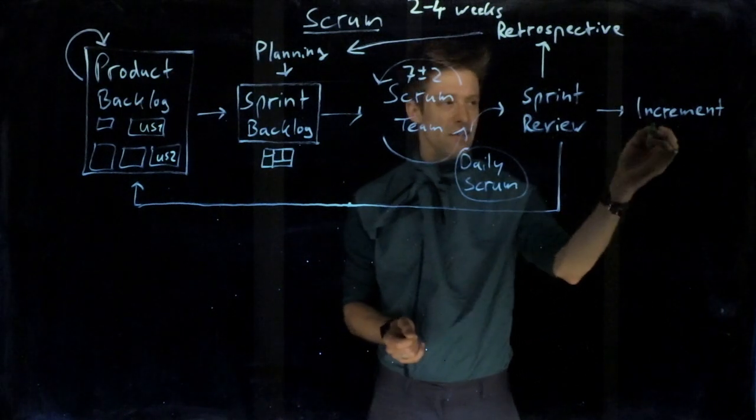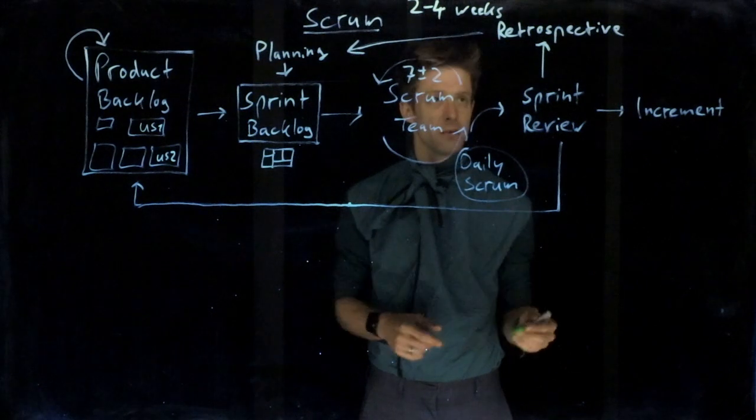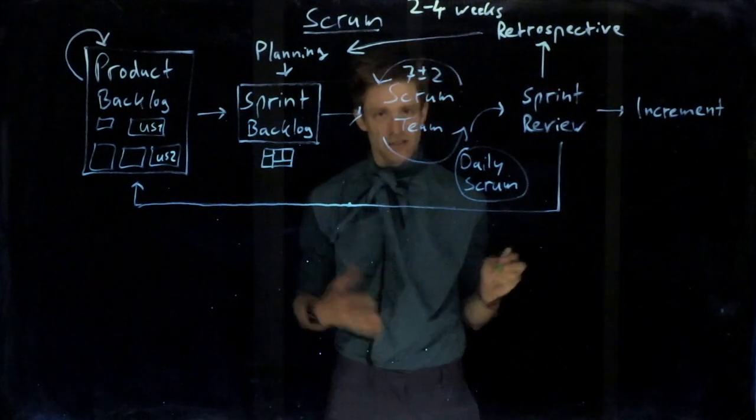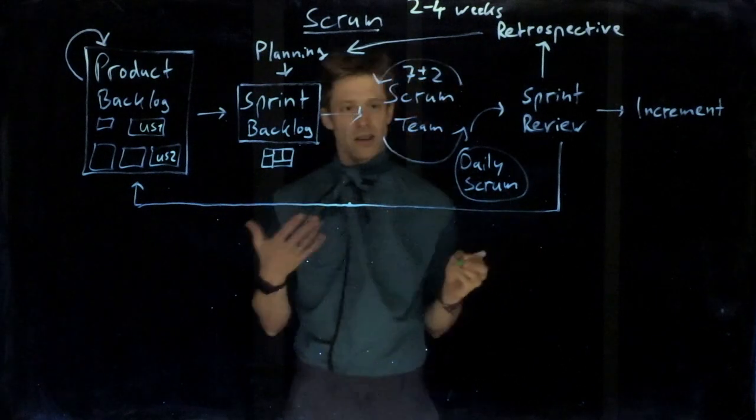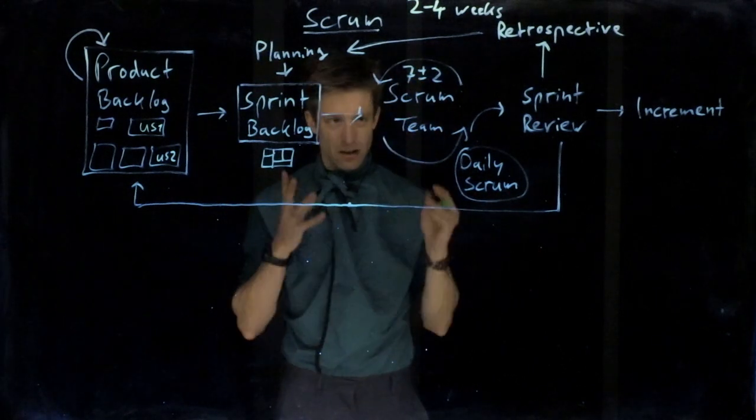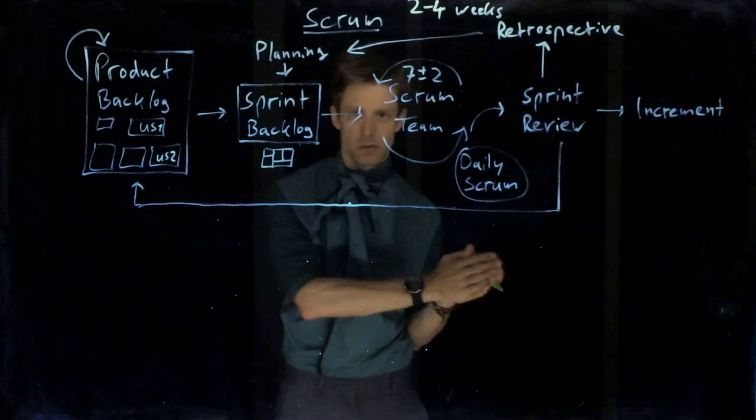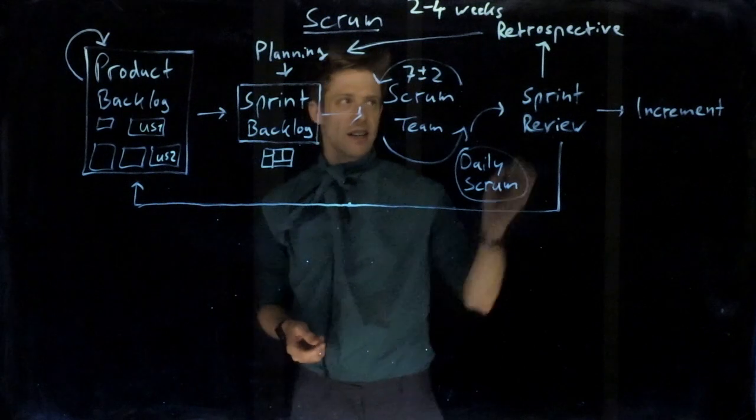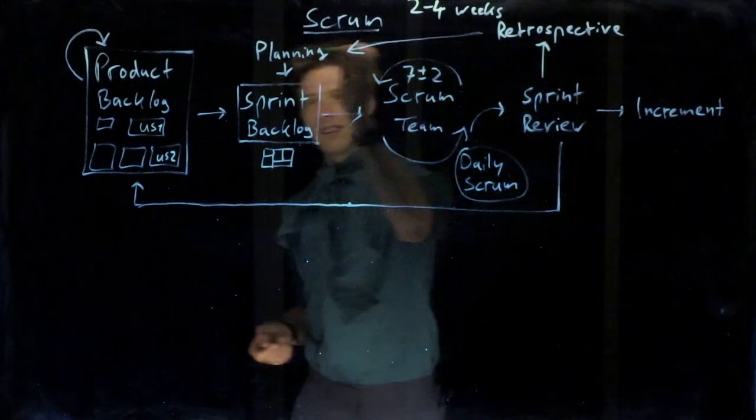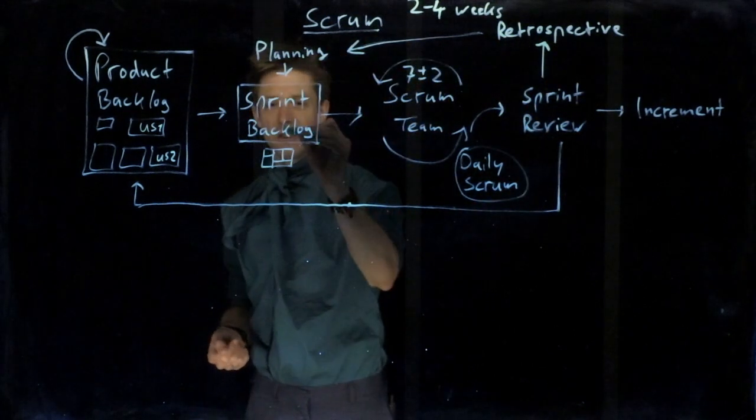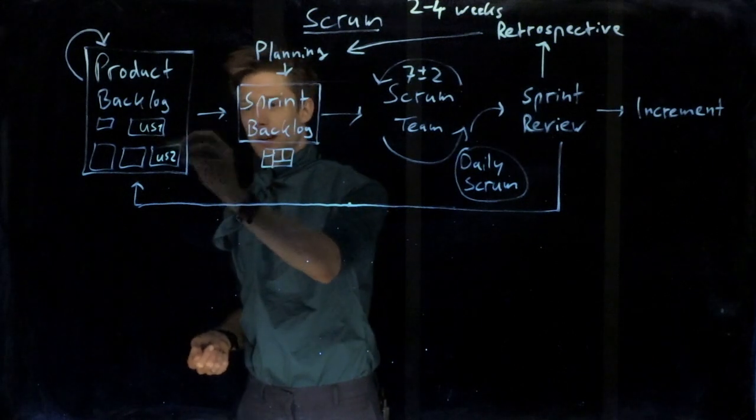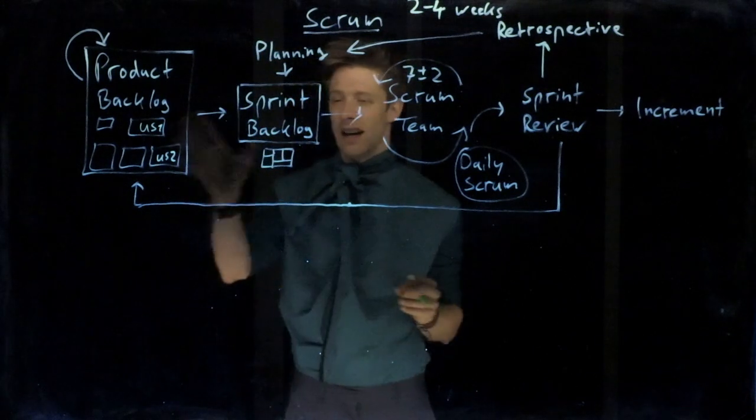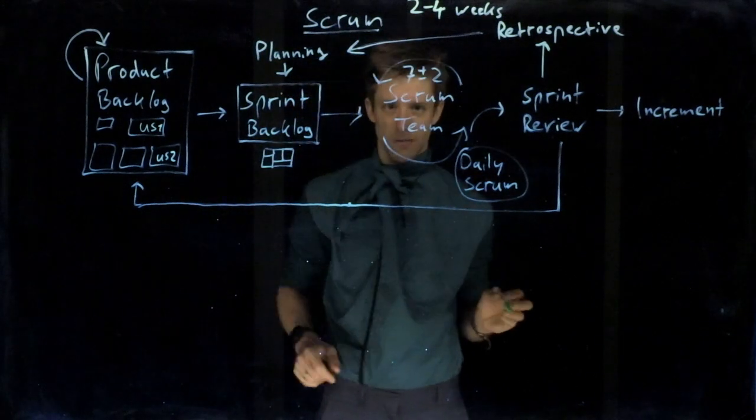Once that is done, you have an increment that you could deploy or just continue working on. Then the team goes on and does a so-called retrospective. They reflect on how did the sprint go. They basically do process improvement. They discuss what went well, what did not go well, what should we be changing in the future. Once they're done with that, they go into sprint planning for the next round. They go back to the product backlog. They choose items that are prioritized, and work on them in the same way as before.